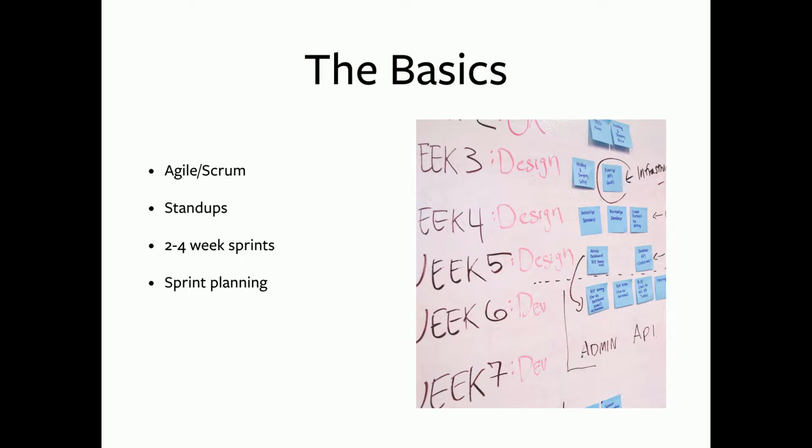And then we have our typical sprint planning, so we're working with our client, looking through our backlog, looking at our roadmap, and pulling things in to plan out the next, at least sprint, sometimes 2, depends on the project again. At the end of each sprint, we're going to do a demo, and that's going to be run either by myself or a tech lead, and we're going to use all of the tickets that we've completed within that iteration and kind of create a script. I review it with the tech lead to make sure we're all on the same page, nothing was left out, and we have the good visual for the clients. They know what we've been working on.